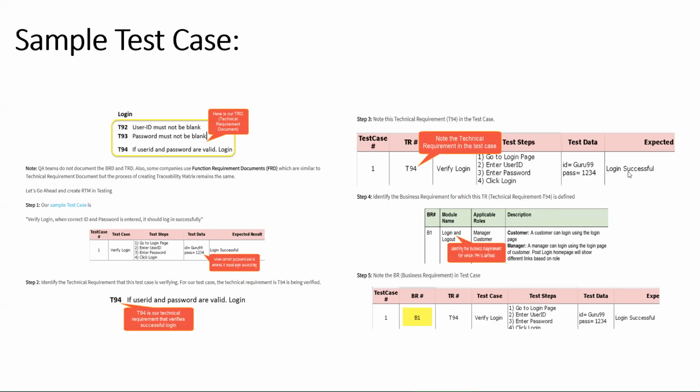Okay, let me just enable this sheet for editing. The sheet is divided into multiple phases. When you are working in the solutioning phase, this is where you're going to be. So your solutioning design is where you would be tracking everything until your project moves from solutioning to build. Then we have your IDs. ID in the sense that you might number each and every process or requirement with an ID. If there is any sub process, you have to mention it here, with any relevant ID.